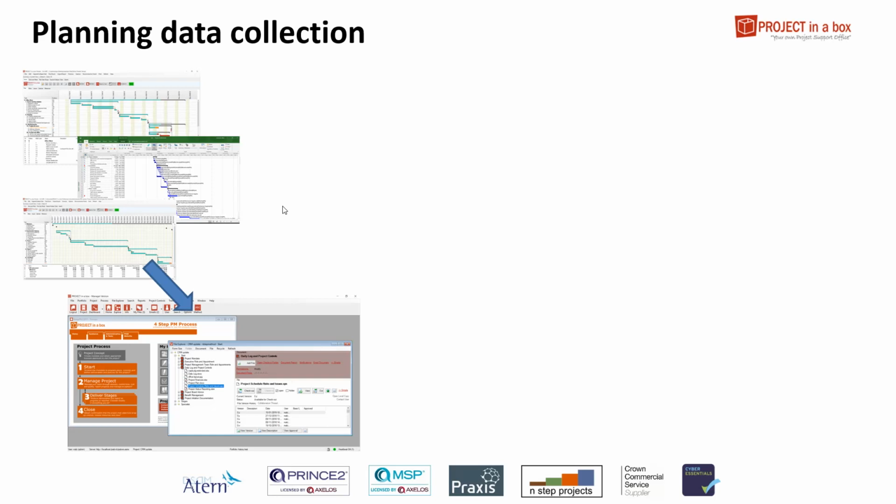We can also bring data in from files which are like transfer files, so Excel or CSV, etc. Those are just simple files in the structure. Anyone who has permissions can access those if they need to. Whenever a file of that type is checked back in, we check to make sure if it's a data source for that project. So we keep a list of those things, and if your file is a data source file, then the data is extracted from that into a central database.